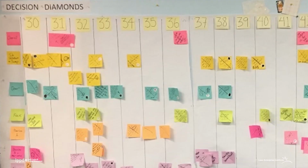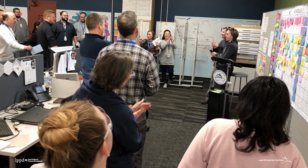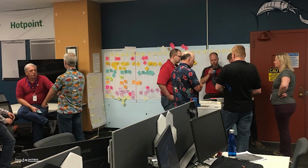Our team loves our decision diamonds. It really has enabled us to make sure that we're making timely decisions, but most importantly, that we're aware of what those decisions are and that we're not letting them stack up. Our daily meeting on Fridays is focused exclusively on decision diamonds. So we talk through it as a full cross-functional team. What were the decisions for the past week? What decisions may be overdue or late? And how does that impact one of the other areas?